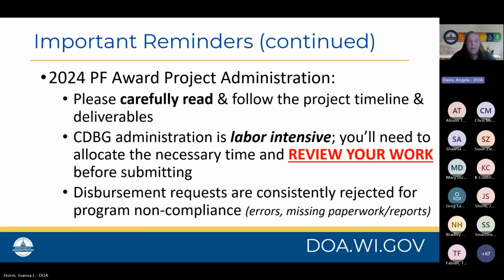Additionally, related to your project administration, we just encourage you to carefully read and follow the project timeline and deliverables. We know that the CDBG administration is labor intensive, so you'll need to allocate the necessary time to review your work before submitting it. Disbursement requests and other reporting are consistently rejected for program non-compliance. This is not a good reflection on the grantee nor the state, but it can also delay payments, and this really can impact a project.